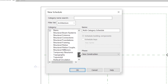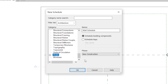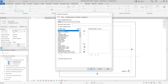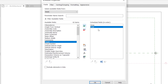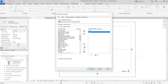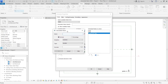I'm going to start with Walls — you can do this for virtually anything: columns, windows, everything. Choose Walls and click OK. Under Walls you can see all the available fields. We're going to add the area of the wall, the cost of creating one square meter of the wall, and the family and type to differentiate external walls from internal walls. You'll also want to add a formula that calculates the area of the wall per square meter.